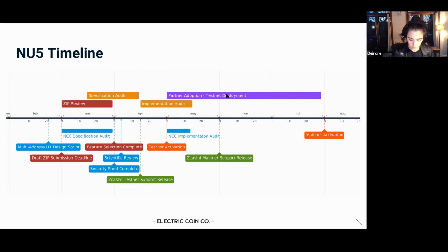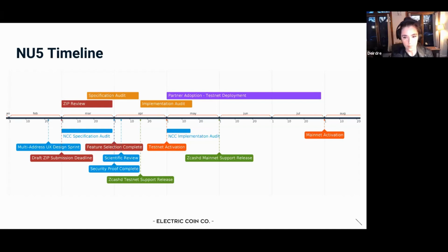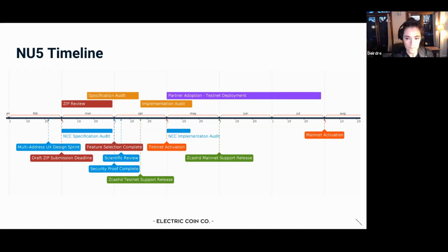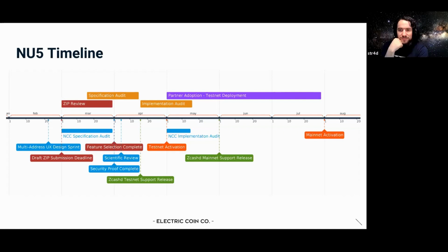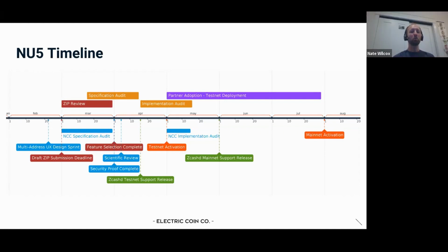Okay. Again, everyone would love a binary answer, but it depends on what it is you're dealing with, to some degree, at least. There could be something that is a consensus bug, but is a one-line fix. Yes. And it might also be like, I think this is doable within a week, and then you get into the weeds. That's why I'd like to have the second half of May as a buffer for when we think we can do it in 2 weeks, and then we attempt it. Yeah. Okay. I still want some way to avoid the problem of, if we had just one more week, we can fix this next issue.